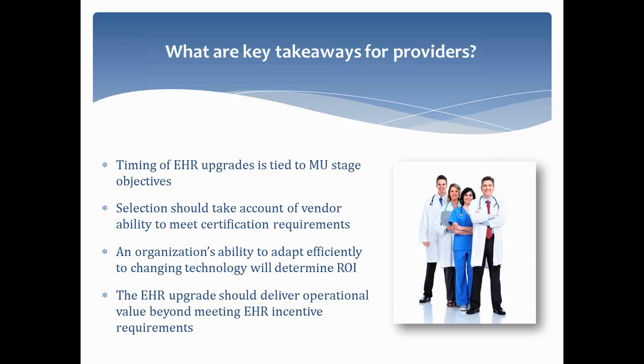I've talked to my vendor. I've got to negotiate. Many times what we've seen is you get in a queue for upgrades from a vendor, and if you're in the back end of that queue, your window has been compressed in order to get the upgrade in and implemented. So the lead time planning is important for stages.